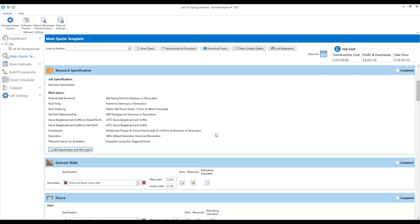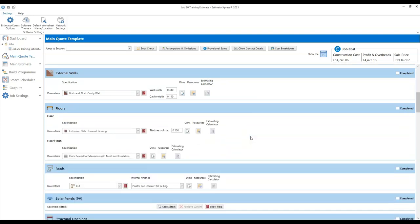If you're happy with your specification, you can get started with estimating the construction elements of the job. If you scroll down the screen, the sections are laid out in a fairly intuitive way — we start with external walls, then look at floors, roofs, and so on. When you're selecting your template, you can choose between the different finishes: brick finish, rendered finish, or stone finish. Because we were using the default brick finish, it has automatically specified brick and block cavity walls. However, if you need a different external wall spec, you can simply click on it in the dropdown box. If you're estimating a two-storey building, there will be a second dropdown for the upstairs walls, so you can quickly estimate half-and-half if you've got half brick, half rendered walls.